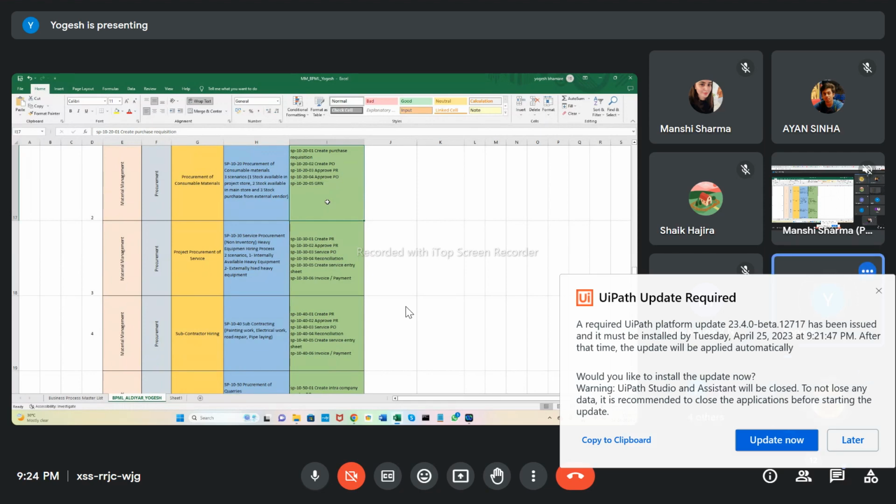So you have to explain, plus the BOQ item. Okay, so this is called project specific material procurement. Either it's a BOQ item, and a BOQ item is very simple. Okay, so that is a single process. But for a non-BOQ item or the consumable item, these 4 processes have to be defined. So 4 plus 1, 5 processes for project specific material procurement.